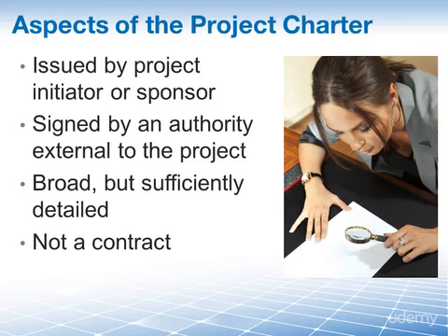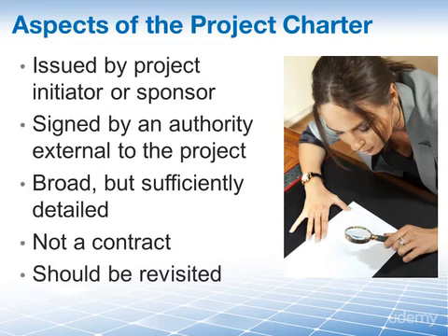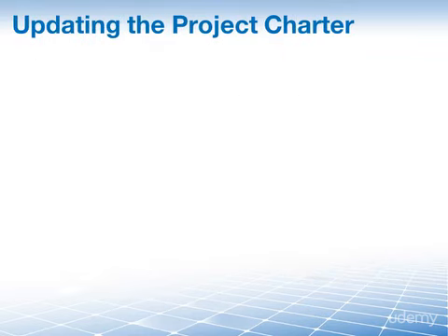Its main purpose is really to serve as the starting point for the project, but it should also be revisited at every phase to validate project decisions. As such, the project charter can also serve as a stage gate to approve the next project phase. But what exactly do we mean when we say that the project charter is created early on?